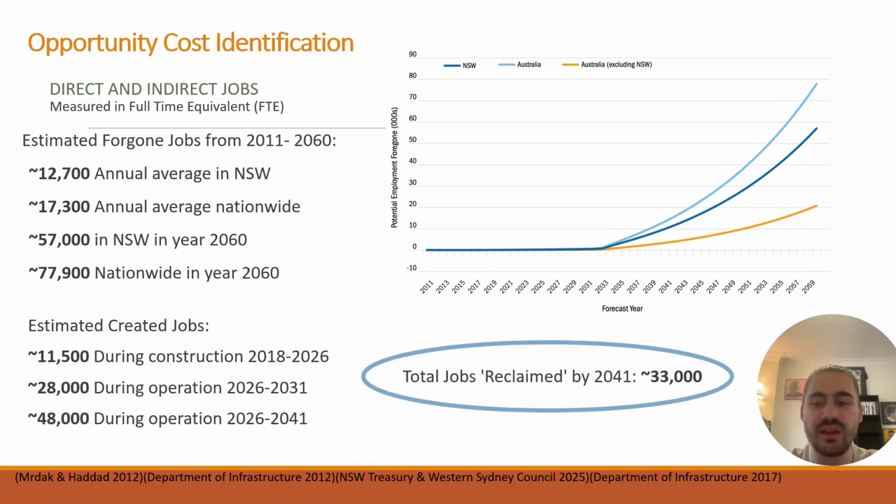The approach of identifying these potential opportunity costs early on in the project allowed for the impact of the project being clear, and once more data was available, comparing the generated jobs and in the future economic value, allowing for reflection on project goals. The potential improvement for this is to ensure that follow-up research is undertaken during the project to identify if opportunity risks have changed, and if so, review any changes in strategy that may be needed.